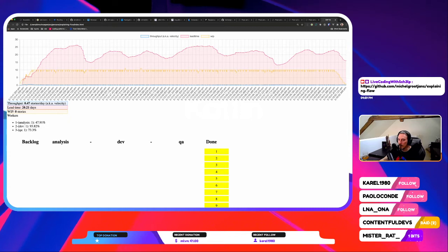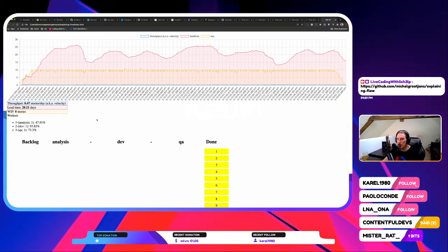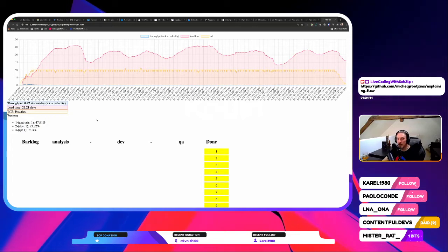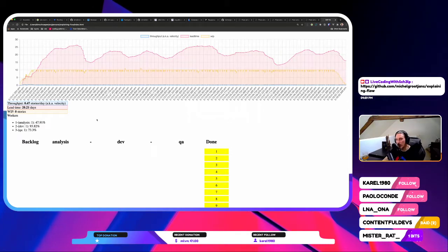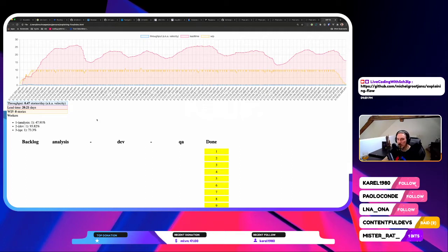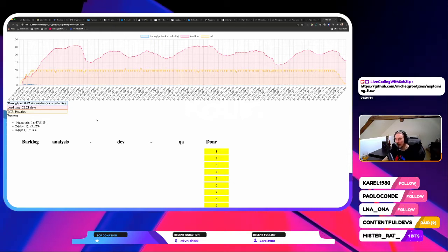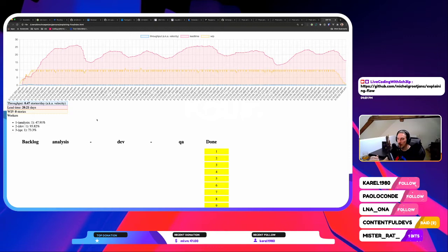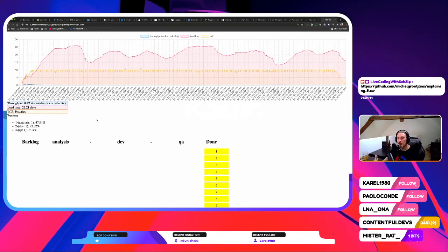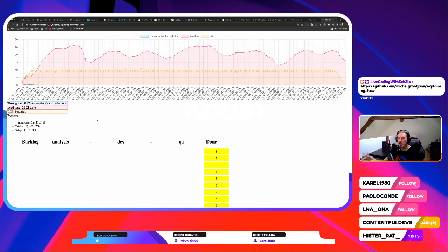What happens then to our lead time? The only thing we did was decrease the amount of work in progress throughout the entire system, and we have decreased the lead time by an insane amount. We halved it when we added an extra developer, but even without an extra developer, by decreasing the work in progress, our lead time has decreased even more. So let that sink in. If the business is more interested in learning faster about a new item put into production, by just decreasing work in progress, what can we achieve instead of just adding new people and even introducing new costs?